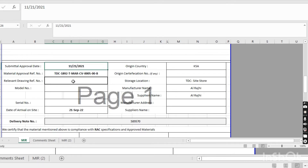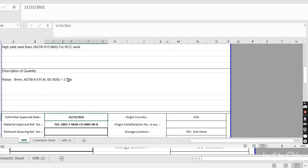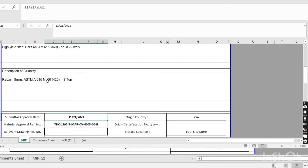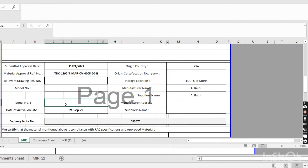If you want, you can also write the relevant drawing number here, because we will use this steel on specific drawings. This is optional. If there is any model number for the material, you put it here. If there is any serial number for the material, you put it here. Then there is the date of arrival at site.